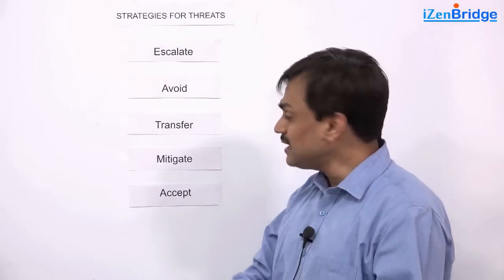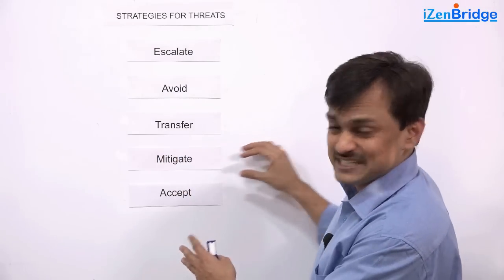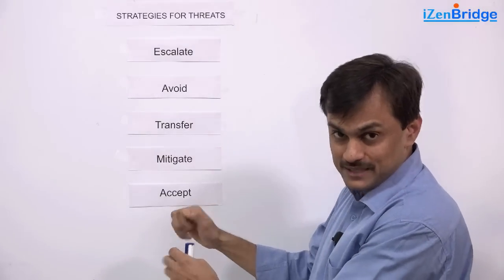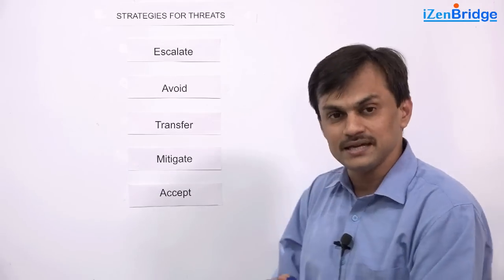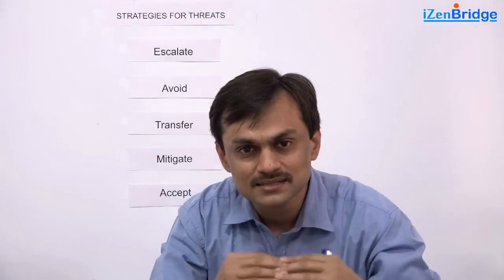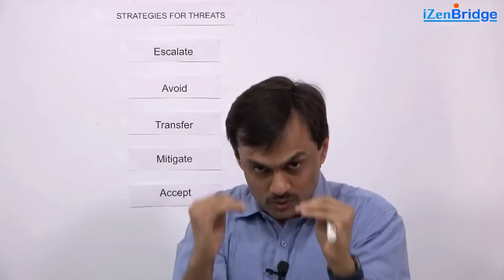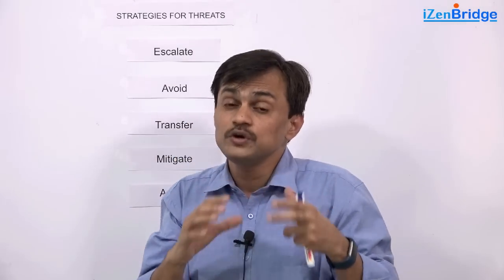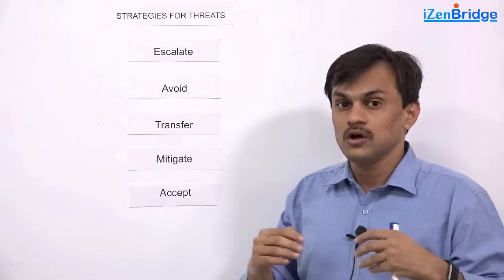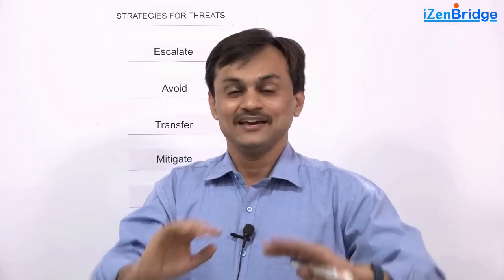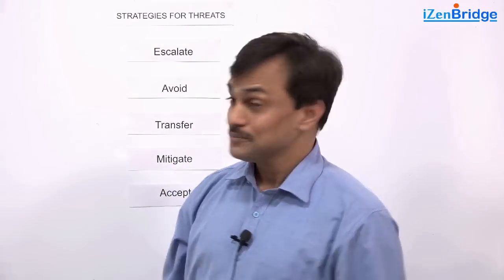Mitigate. And I would say that 80 to 90% of your risks would be getting mitigated. This is the strategy you will use the maximum number of times. That is what I have seen in my project experience. What is mitigate? It is just bringing the risk exposure down, bringing its probability or impact down by way of doing something, by way of doing some proactive steps now, planning them in your project so that risk becomes less risky. It will still remain risk. You are not removing it because it is not avoiding but it becomes less risky.